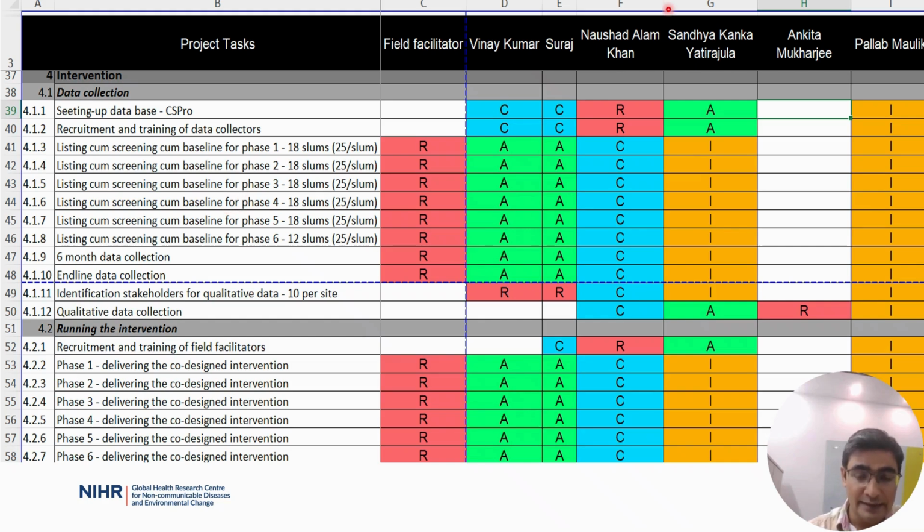The second step is to identify all the key roles and the people involved in the project, which we have already completed during our resource mapping or resource allocation. These are listed across the top of the chart, with each column representing a different person or role.